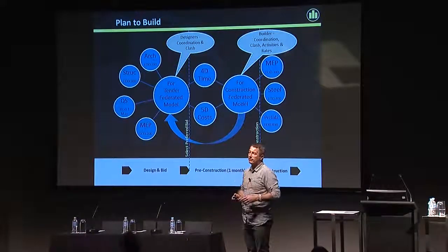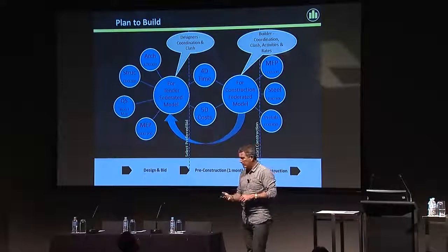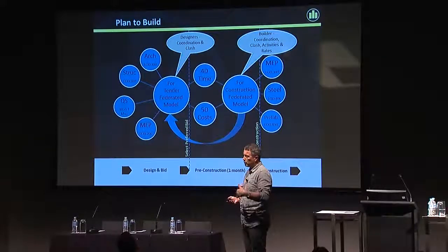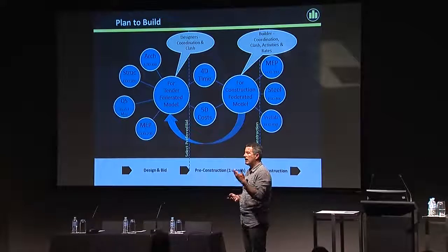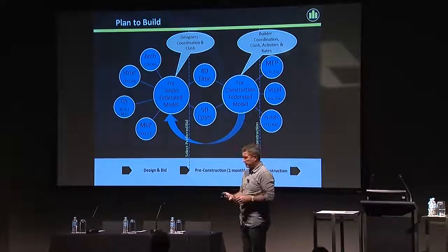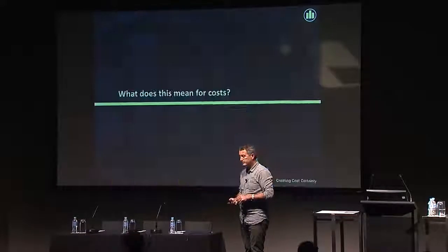And if that leads to variations, well, so be it. Those variations will be far cheaper than anything that occurs on the site. And in terms of a workflow, I think it's a far better way for this to occur. All that's required at the moment is just permission and a license. So permission from the consultants for our contractors to use those models, and a license for them to use it in that way. And it just isn't that complicated. And basically that's what we saw on the Southbank project.